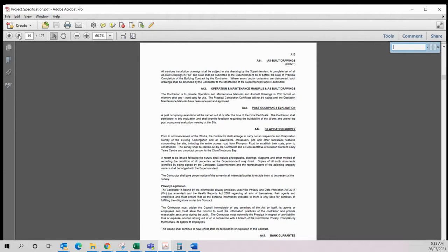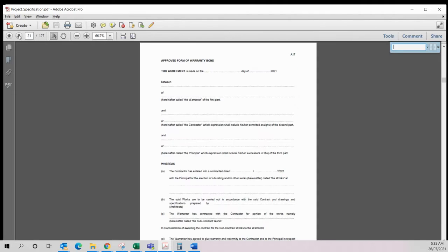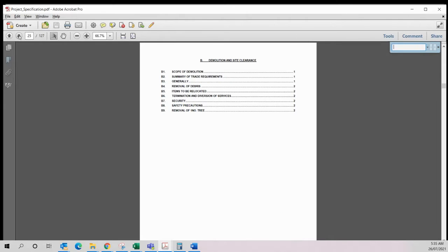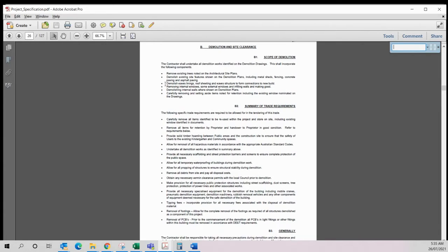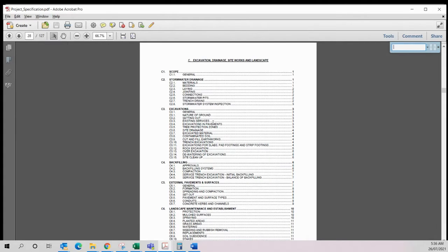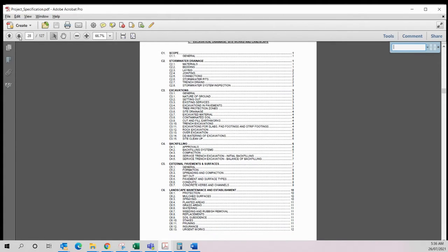I'm just double checking there's nothing in this first area of the spec that'll have the information we need. There are notes around keeping the existing security system alive while the works go ahead. So this one might require an RFI to make sure we are capturing everything.